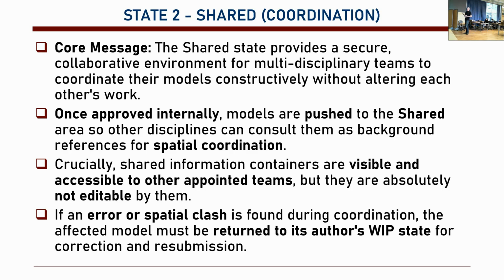The second one, shared, coordination model. The shared state provides a secure collaborative environment for multidisciplinary teams to coordinate their models constructively without altering each other's work. Basically, we want to have different teams share their models so that they can come together and create an environment where we can work. So basically, once the work in progress is checked and it is ready to be shared, we push it to the shared area, then other people can consult them for spatial coordination.